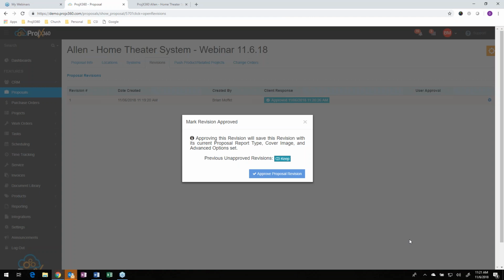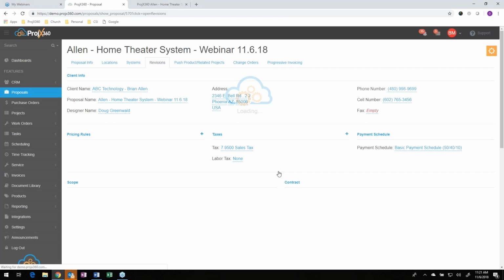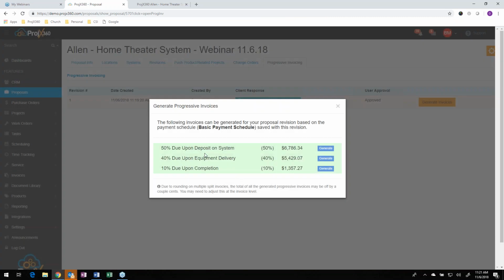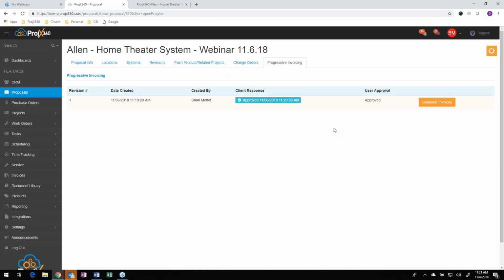Because I'd like to go back and reference when the client says, well, how come we didn't do that TV in the master bedroom? Well, we did, Mr. Client. On revision 4, we took it out because of cost. So I always keep them personally, but you don't have to. We give you the option. And now that I did that, you see how this new progress invoicing tab popped up? So here's where you're going to be able to generate progress invoices as needed from the payment schedule. You can select which one you want to create, and you can create those.